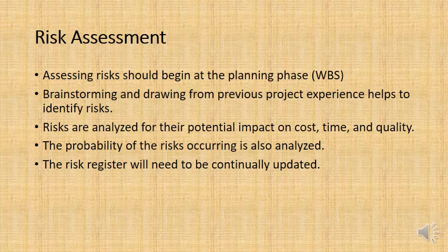You're not looking at impact or probability at this stage. You're just trying to make a big list of all of the risks. And the best way to identify risks is actually to draw from previous experiences from projects that are similar to the current project.